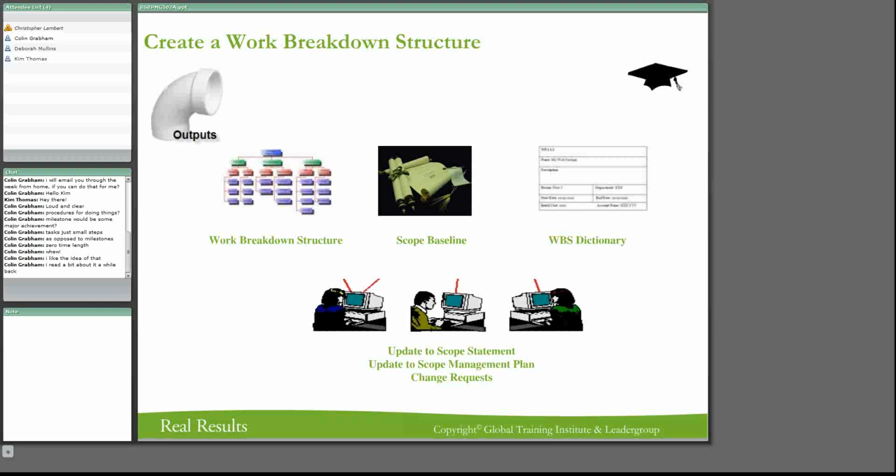It gives us a lot of flexibility, but it also has a risk attached to that. Right? Anybody can hazard a guess at what the risk is? What would the risk be of a rolling wave? It's a good one. Probably not enough planning, but it has a problem and the risk of scope creep. All right. Remember, you can actually now expand your activities, and suddenly you've got too much here. So it's not so much planning as it is scope creep.